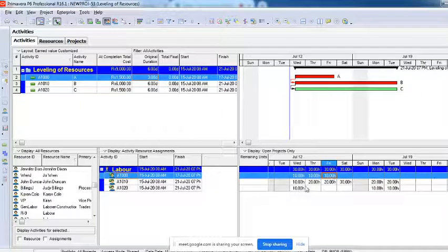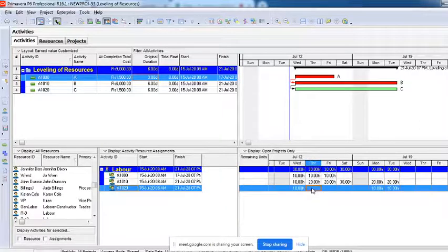That means as this activity has a float, I'm utilizing the float and then splitting the activity. This is called splitting, or resource adjustment. Resource adjustment is also similar. Wherever there is availability of float, that much you can utilize the float and you can bring it to normal.